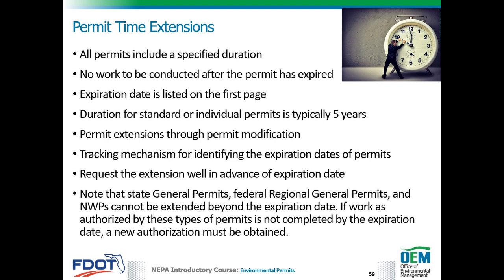It is important to request the extension well in advance of the permit expiration date, since the extension request must be processed by the regulatory staff in a manner consistent with any other modification request. The staff should specify the period of time necessary to complete the project, so a new expiration date can be set.